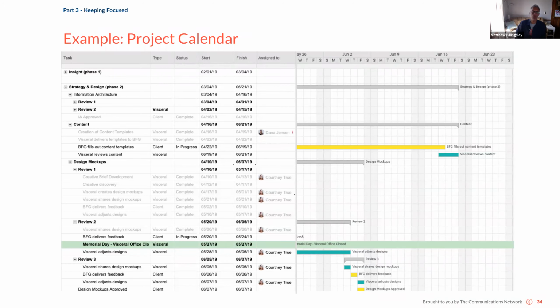And what's really covered up in this, that we're not unfolding here, is that we also bake in review periods. In that long timeline for design, we have various reviews. We have time for our client to take a look at the designs and give thoughtful, actionable feedback. Sometimes that just takes a lot more. If it's a larger site, we need to do more mock-ups. It just depends. If it's a smaller site, we may do fewer screens. So it's good to bake in that extra time so we can be very thoughtful about the decisions we're putting into the design.